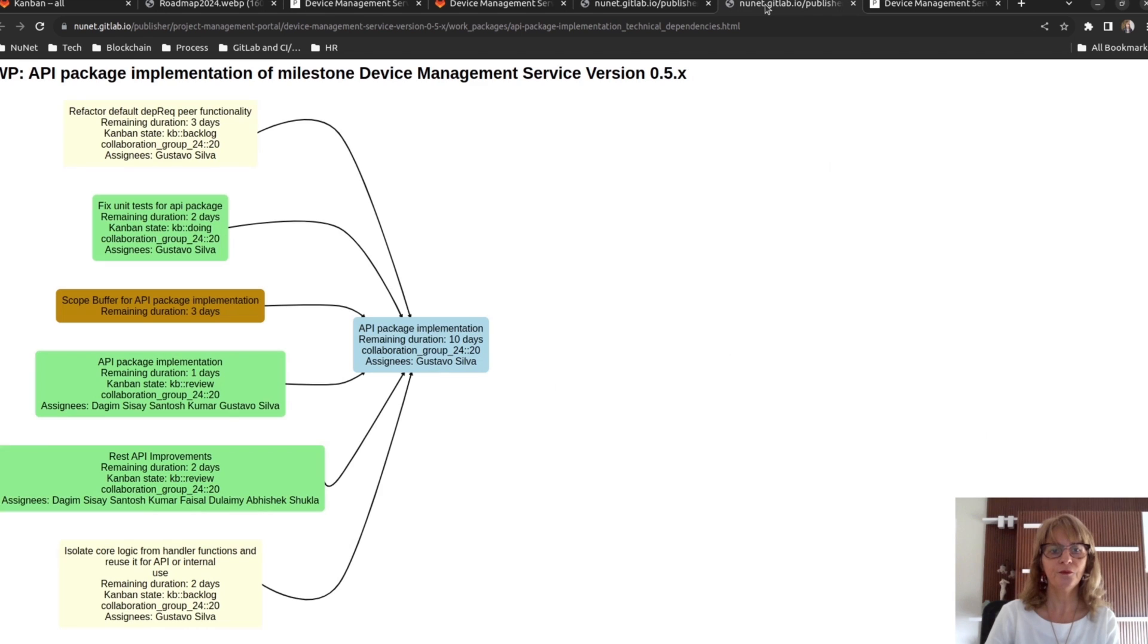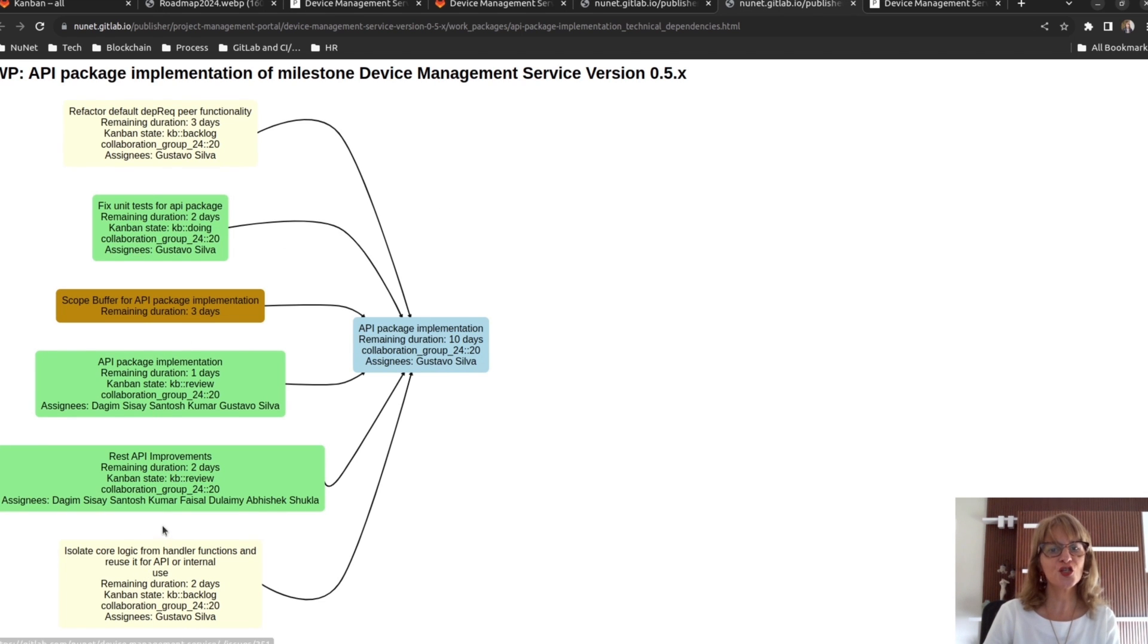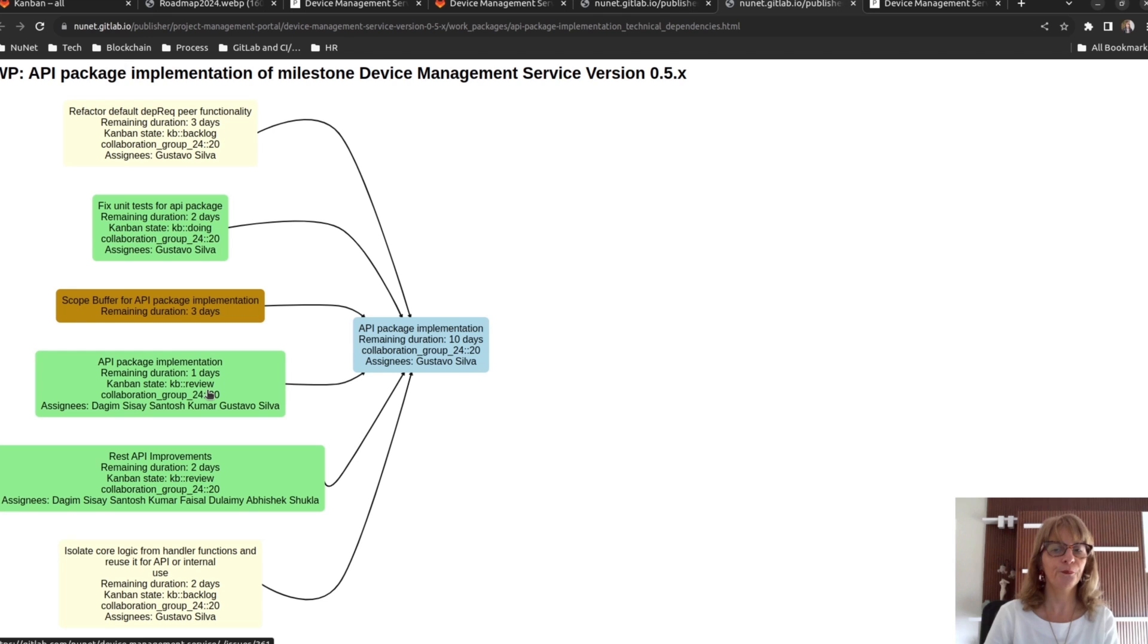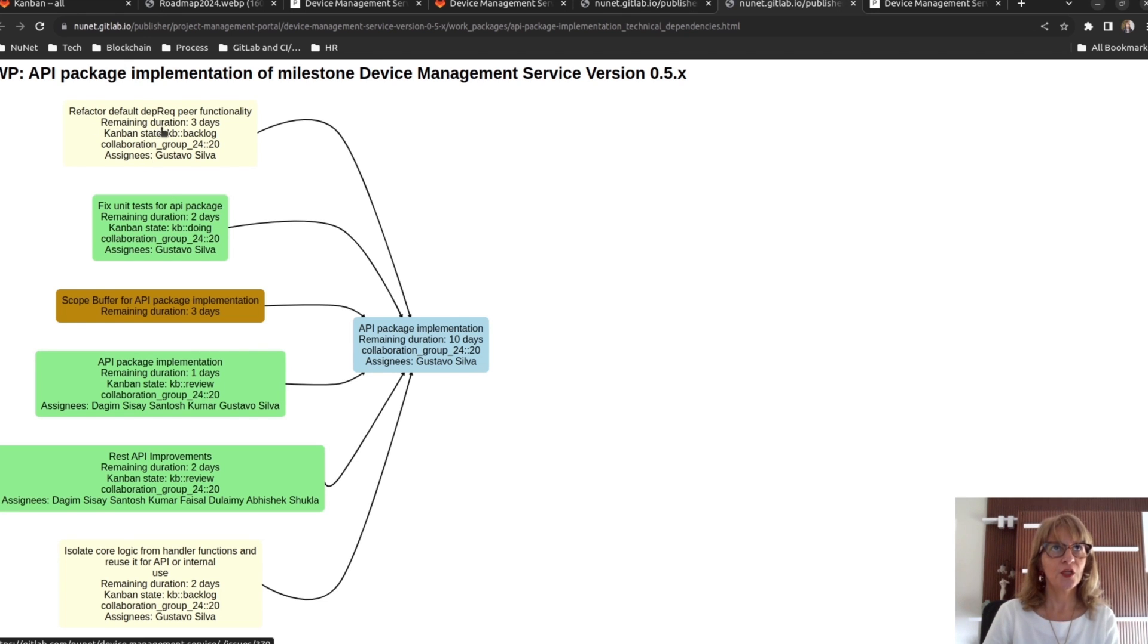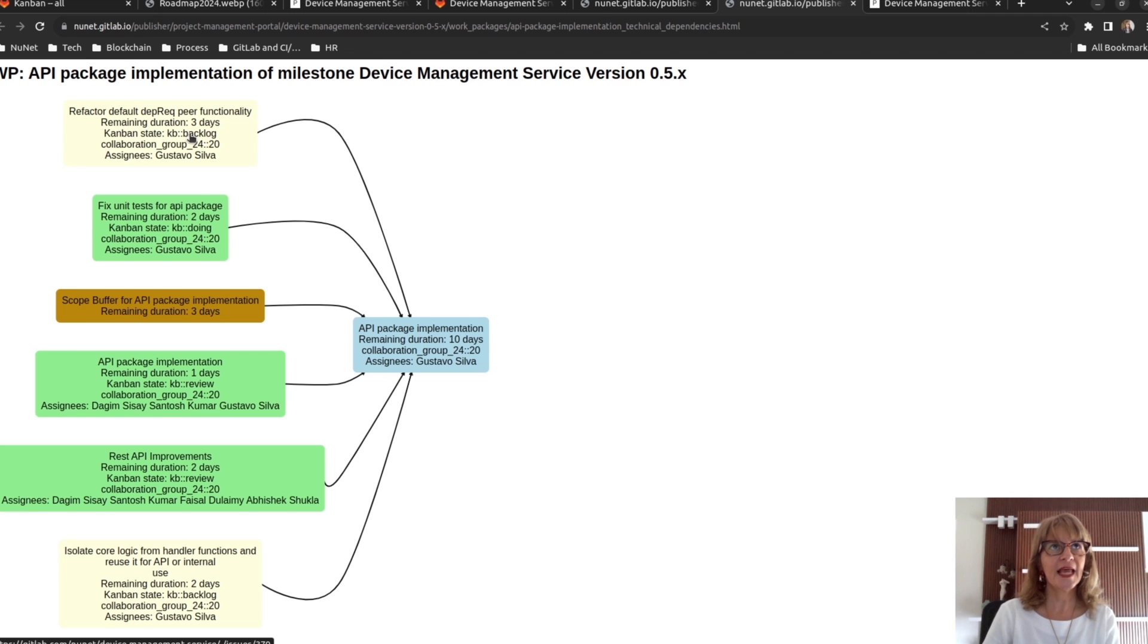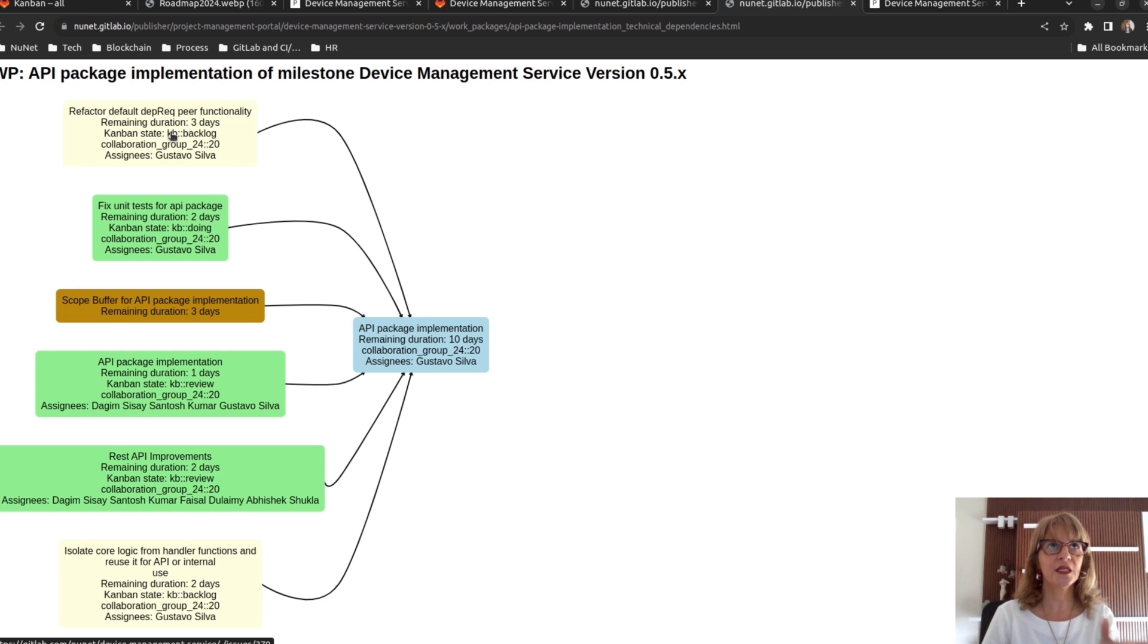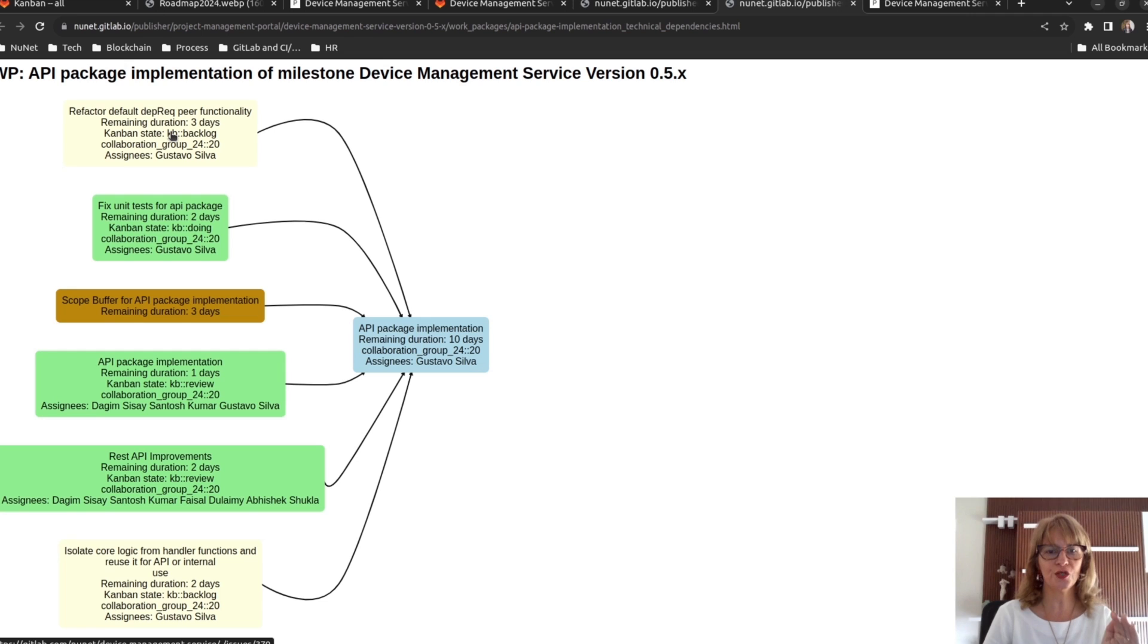Here, backlog, doing, review. The remaining duration of a task in backlog is actually the estimated duration for implementing that task. And this estimation is done considering perfect conditions. Okay?